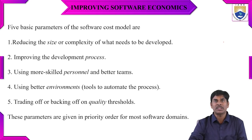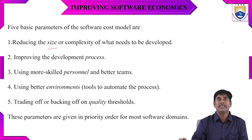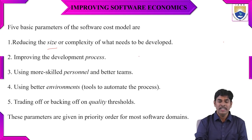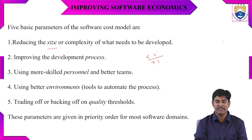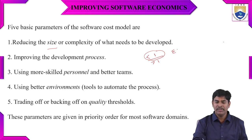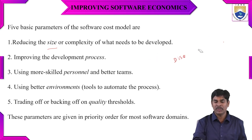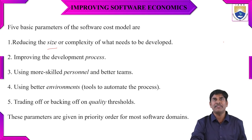The five basic parameters of software cost models are: size, process, personnel, environment, and quality. For size, we need to reduce complexity of what we are developing. For process, we need to verify whether the process exponent is less than or greater than one. If using human-generated coding, we minimize it — the process should be less than one, giving economy of scale. When greater than one, it is diseconomy of scale.